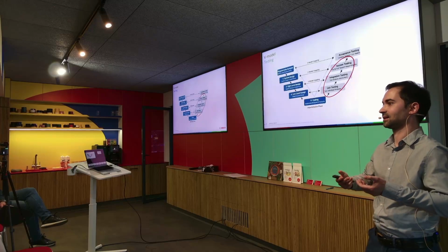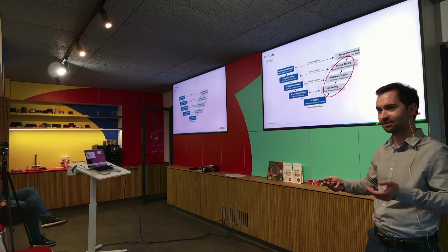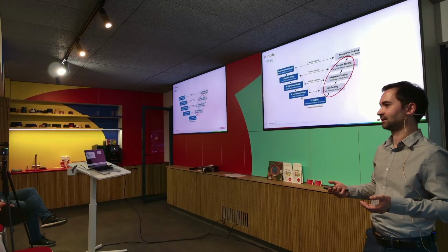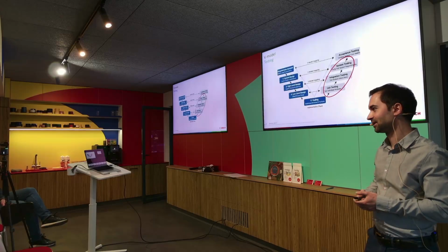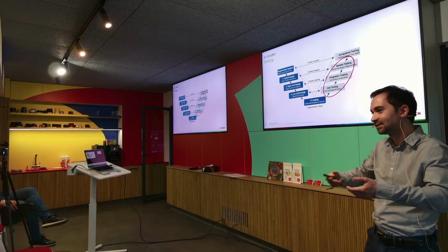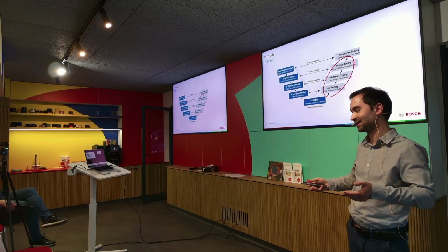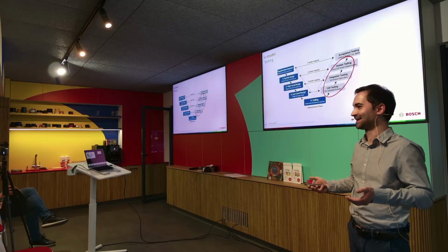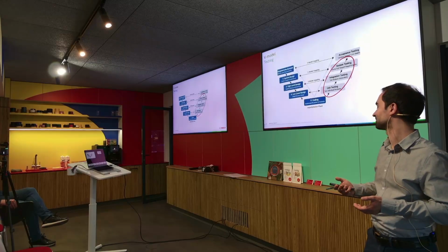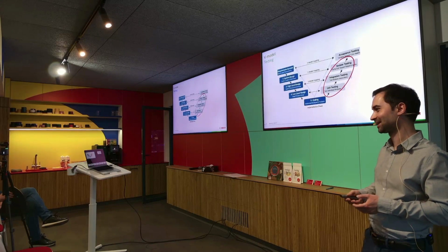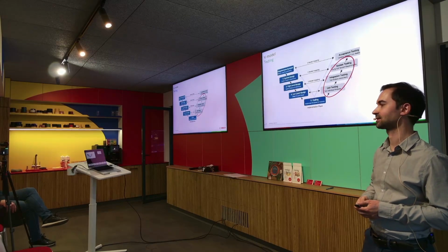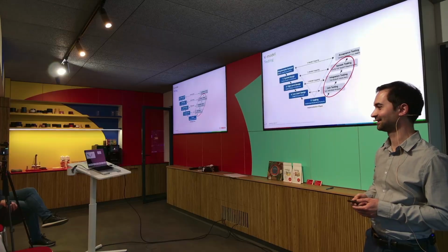Once I asked them, okay, the deadline is coming and you never ask about the status, how come? And they told me, because, Mr. Szendrei, we don't need that delivery. Your project manager told us that from your internal process you need to deliver it, but we won't use it for anything. And then I said, okay, then it's not a problem if it's 2 days late, right? And they said, yeah, perfect. 2 days later, perfect. We still won't do anything with it. And then I could tell the project manager, and he was happy and relaxed at the end.